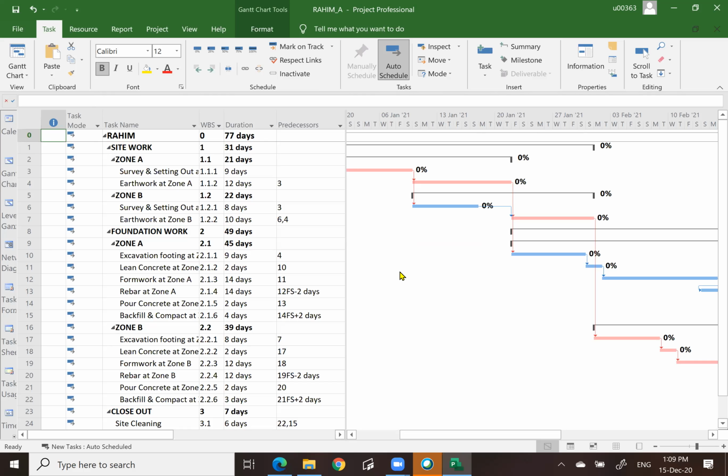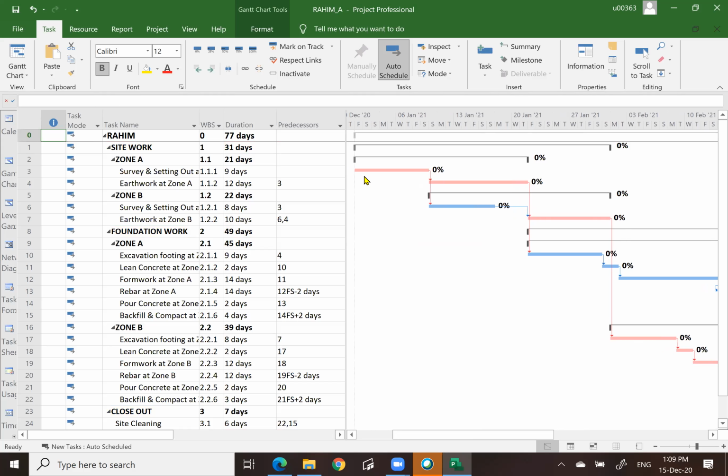The original view is only the Gantt chart, but now it's the Tracking Gantt. You notice that there is one bar for each activity, meaning we have not set this into the baseline yet. If we already set the baseline, you will notice there are two bars for each of the activities. Now we are ready to set the baseline.